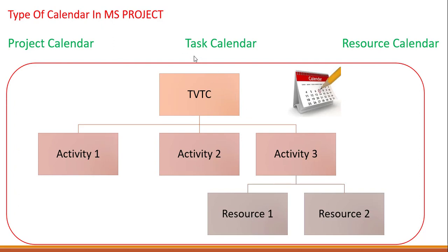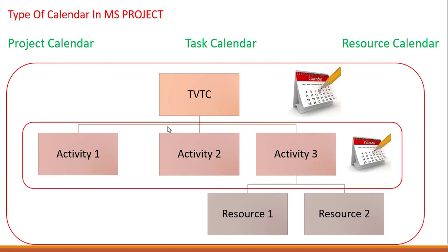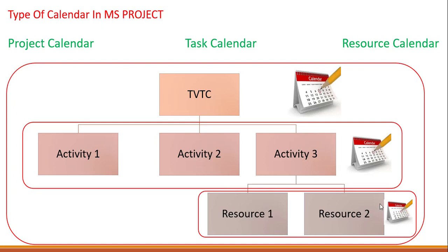And if you create a task calendar, it will only affect the activities. And if you create a resource calendar, it will only affect the resources. So this is the difference between project calendar, task calendar and resource calendar. I hope you understand the difference.